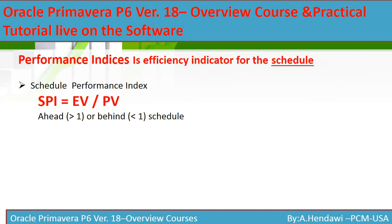Performance indices are efficiency indicators for the schedule. High-level stakeholders like a chairman look only at the key performance indices in high-level reports — they don't check the WBS or activity details, which are left to the project manager and team. Schedule Performance Index (SPI) equals Earned Value over Planned Value. If it is more than one, you are ahead of schedule — what you earned is more than what you planned.